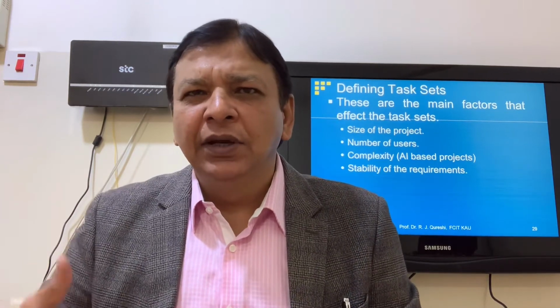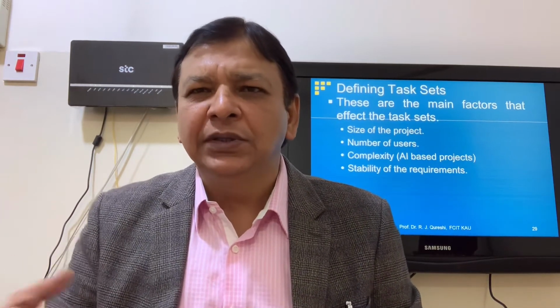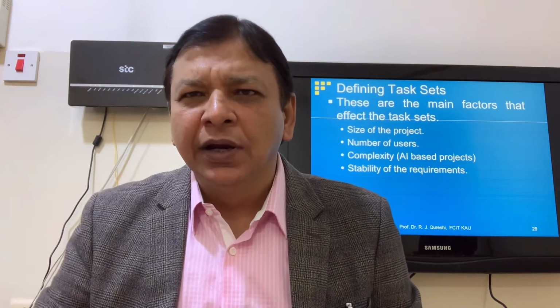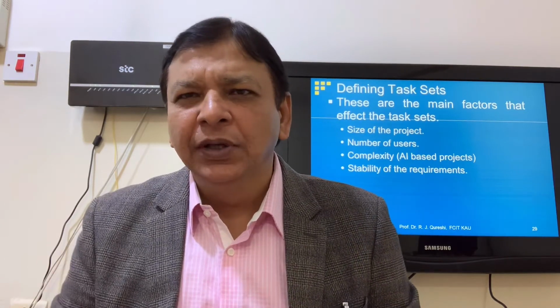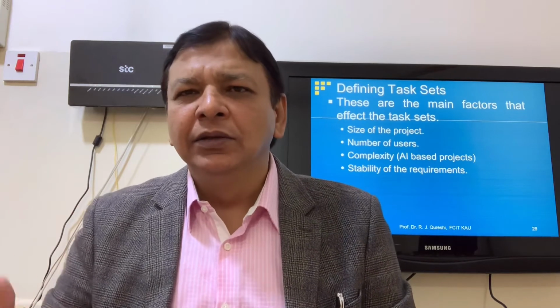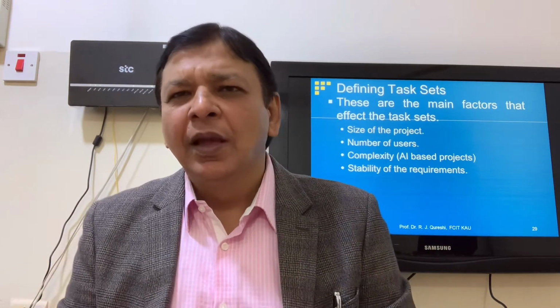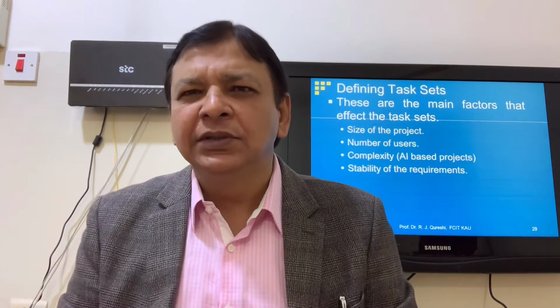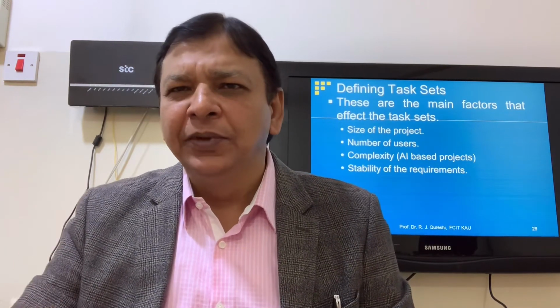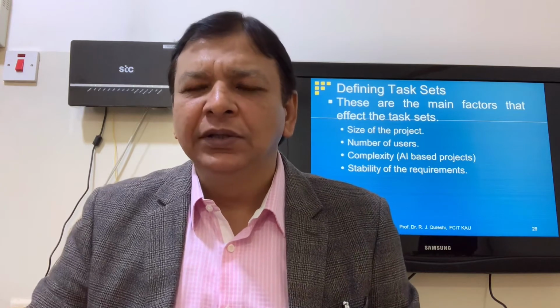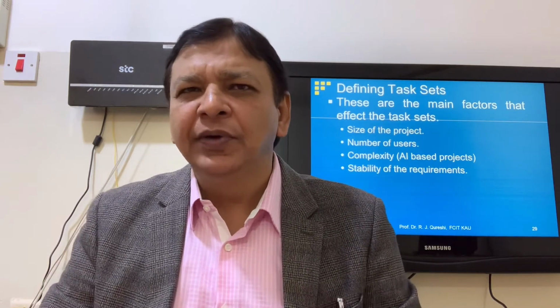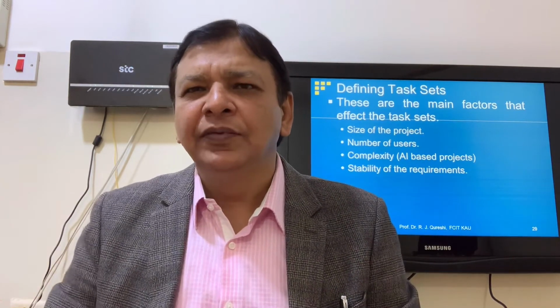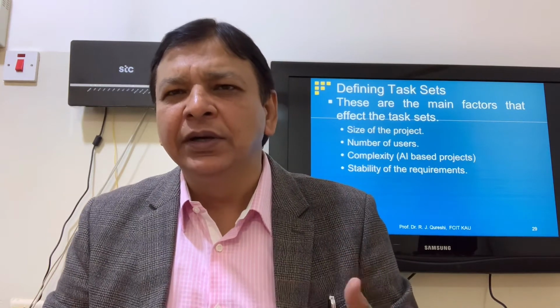Agile methodology is suitable for speed optimization when time is critical for the software company or the customer and cost does not matter. But if you want cost optimization and requirements are stable, similar to a previously completed project, then waterfall methodology is the most suitable. Task sets will be different according to the stability of requirements, or if they are not stable, continuously changing.